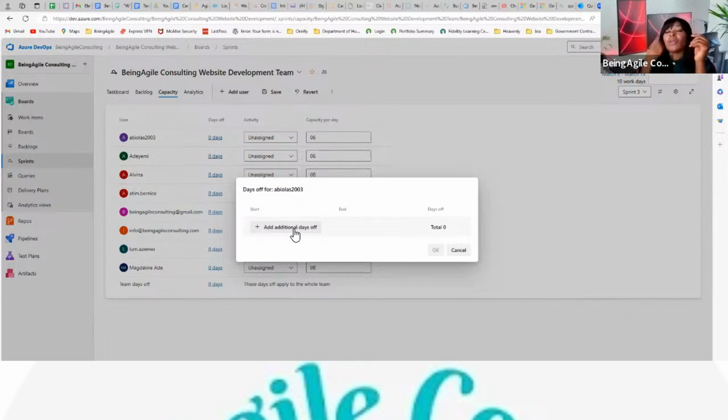For example, most tech leads hardly ever commit to doing actual development work for the team with all of their hours. Typically, if they're supposed to put in 80 hours in a 2 week sprint, they only actively put in 10.